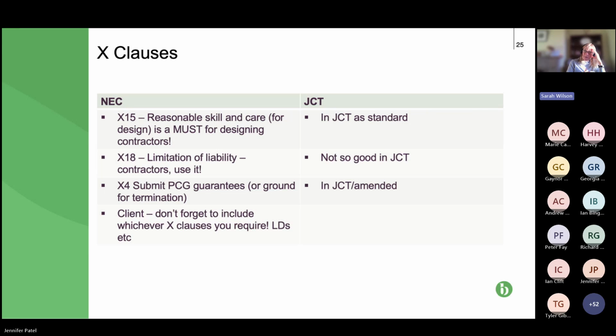So it deals with consequential loss. It covers an entire cap on claims. It limits time in some cases, whereas JCT, particularly the design and build, focuses on consequential losses only. So it's not as good for a contractor or subcontractor. And as for the securities, parent company guarantees, bonds, retentions, liquidated damages, etc., they're all included in the main form of JCT.